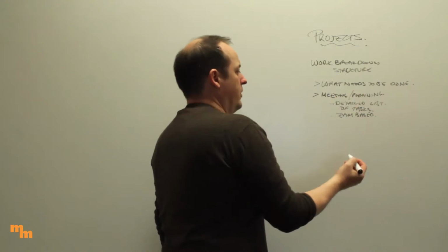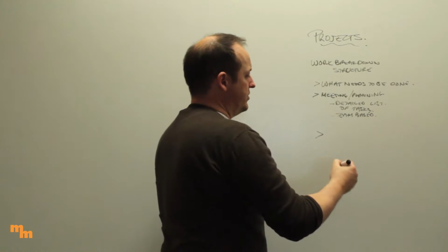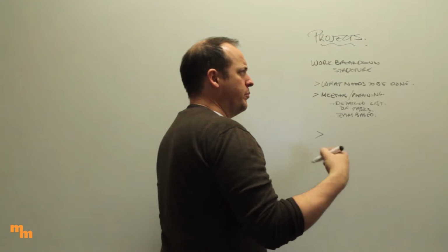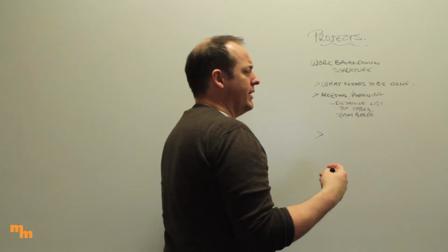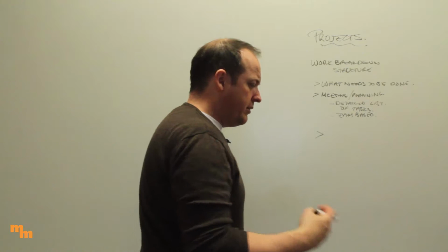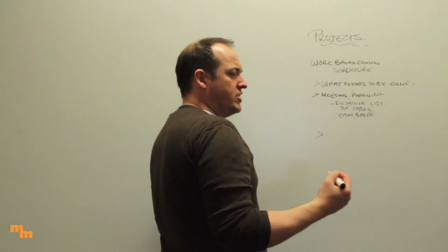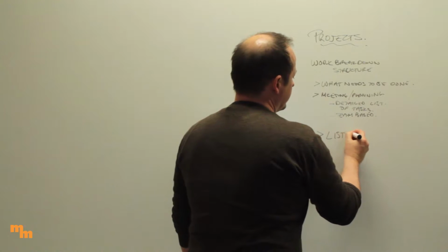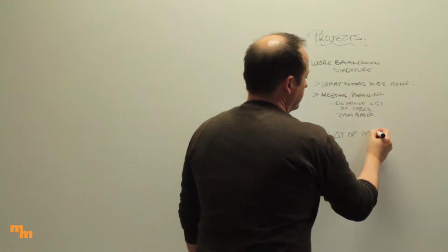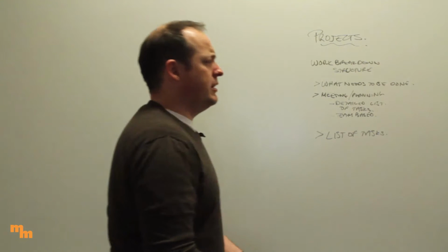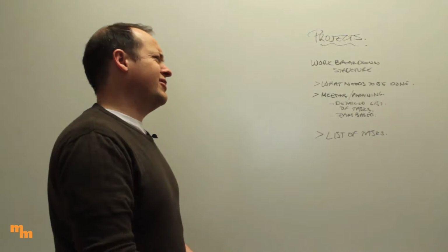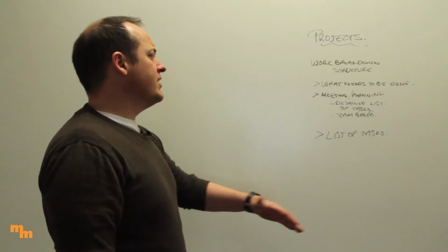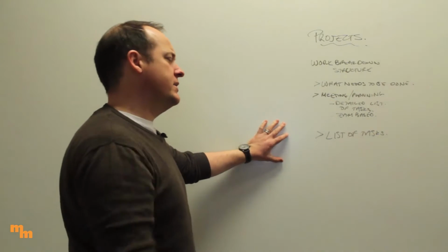And look, one of the key things there, particularly at the beginning when you're starting to put it together, is don't worry about needing to start at point 1 and go through. The first thing you need to do is just start thinking about what the tasks are. So just get a list of tasks. Just start talking through. You can break it down into a logical manner later, sort of say, well, here's the beginning. But just start to really quickly identify what the key tasks are.